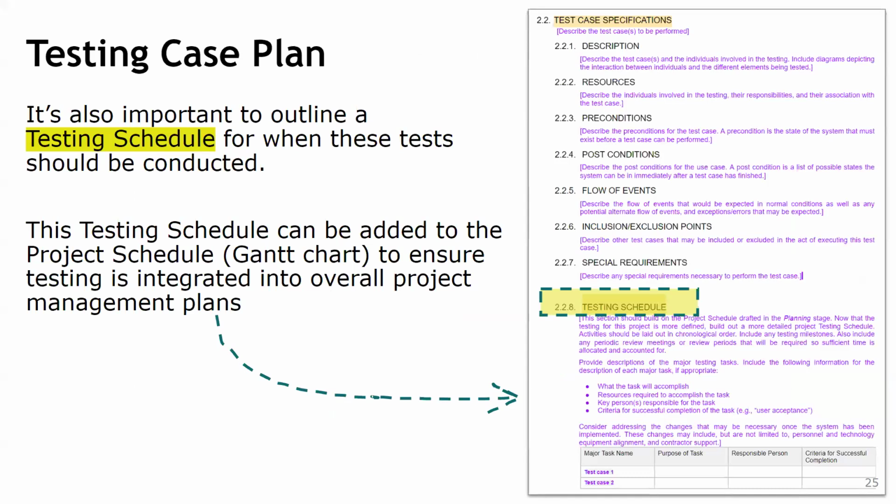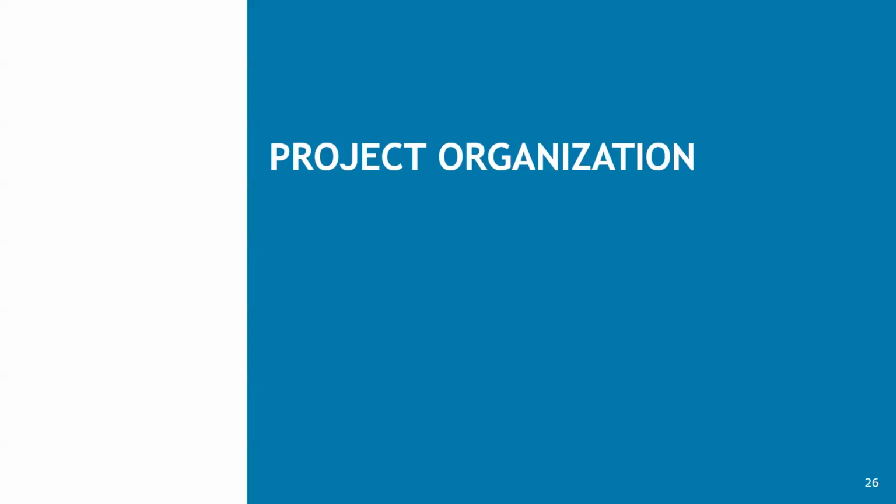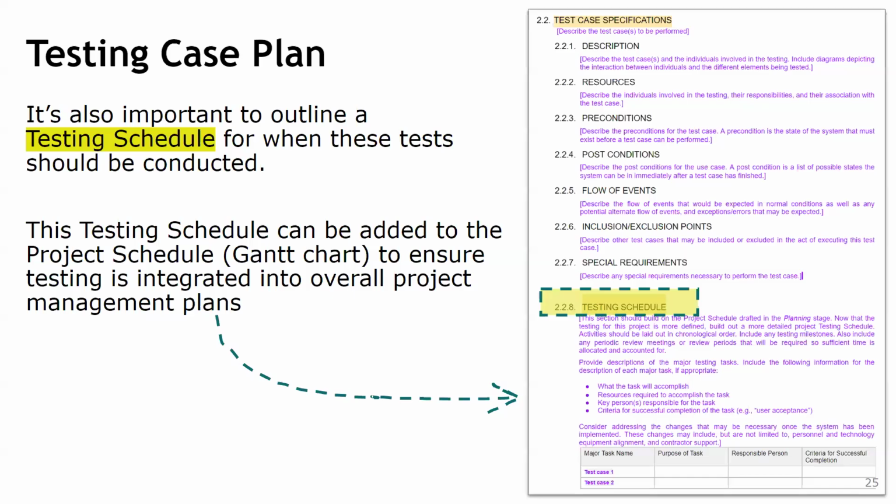Okay, so that's the test case, and then the testing plan. So with the testing plan, you need to have a schedule of when you are going to run your test cases. So now you already planned your test cases, then you need to plan when you're going to run them, and also the people who are responsible for running the test cases.